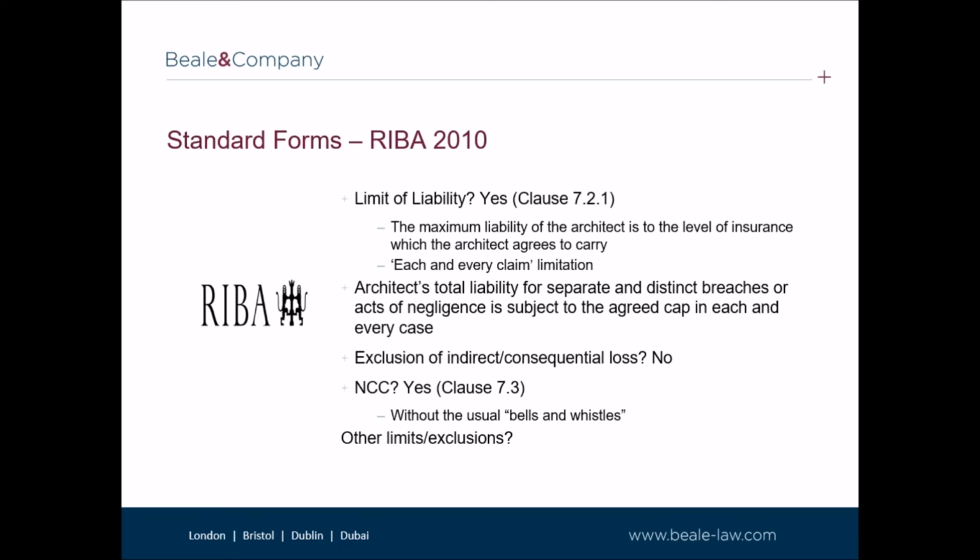The net contribution clause in REBA 2010 is now narrower than under the REBA agreements, or indeed the ACE agreement. It only refers to consultants and contractors, and there is therefore a danger that some of the other people with whom the consultant could be jointly liable are not brought within this clause. It is therefore preferable to extend this drafting to match the ACE agreement.